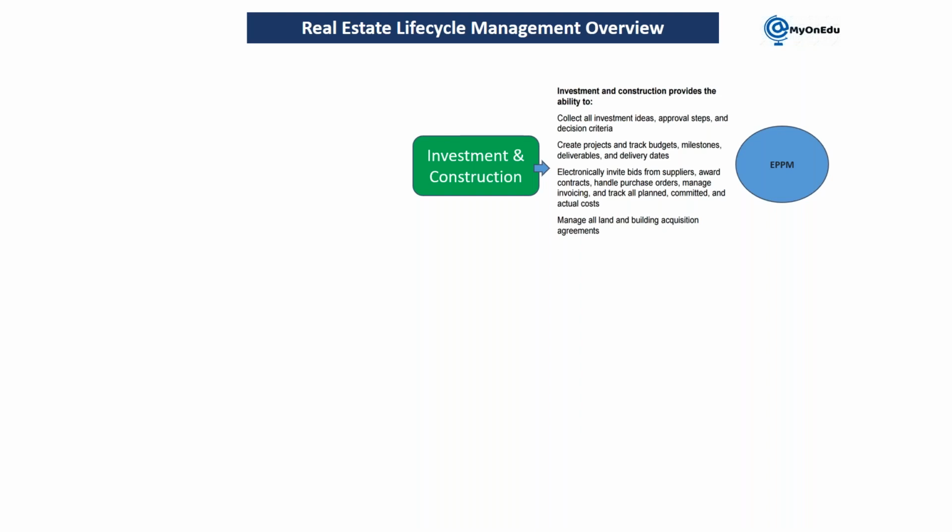Portfolio project management has an additional license. So if cost is a concern and you don't want to include additional cost, in that case you can choose investment management. That module is available in your core SAP. So IM is also basically used to study the feasibility of any project and to manage the approval process.